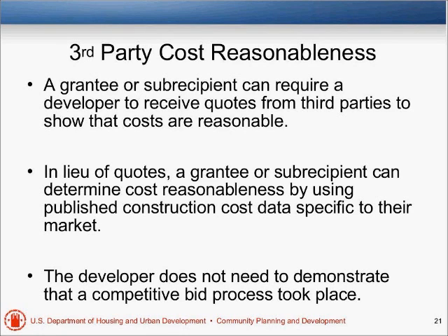But often I've seen folks follow what their housing finance corporation uses for housing credit deals. Sometimes they back off on that a little bit because these deals have a little bit less risk and a little bit less complexity to them than a housing credit or a bond deal. And those usually are in the 14 to 16% range for multifamily deals. But a lot's going to depend on what they're doing, how much risk they're taking, and what fees are in your market.